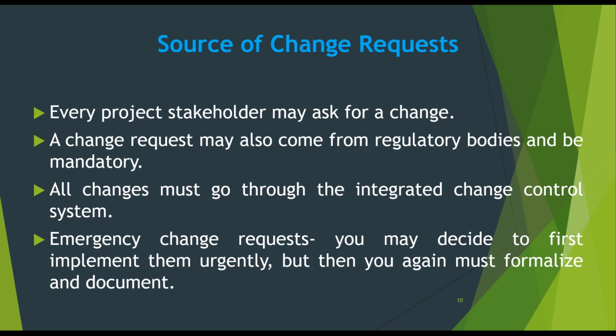The source of change requests — it may come from stakeholders, because stakeholders may ask for changes at any time. A change request sometimes comes from regulatory bodies or from senior management. It is mandatory that any changes must go through the integrated change control system, to know whether it has any effect on the budget or schedule. Sometimes emergency change requests will come; you may decide to implement it first and at a later stage update the project management plan or project documents.